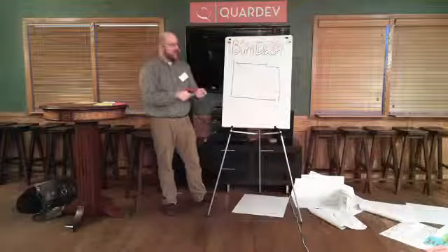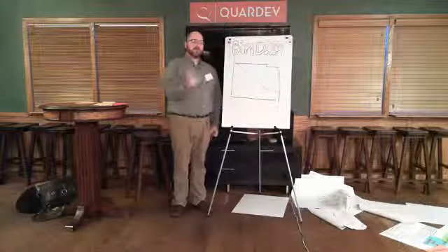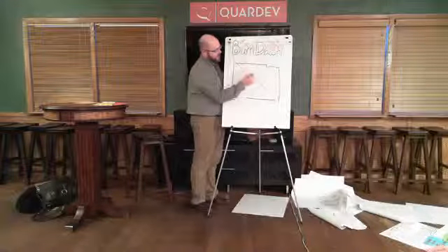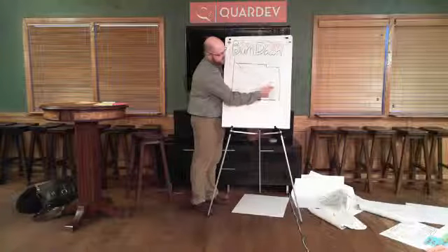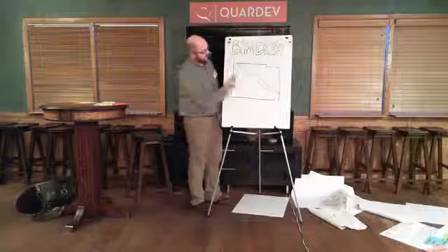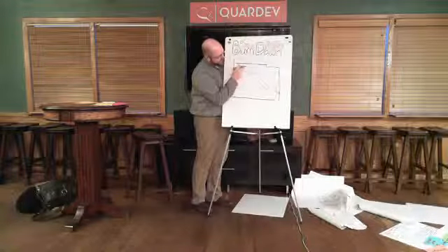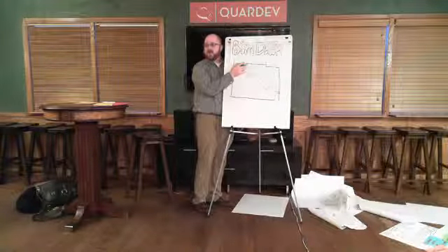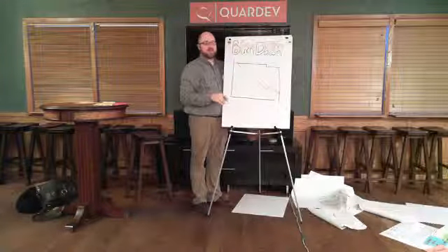But an exciting thing here, I bet you can see where this is going. Let's burn down acceptance tests that are completed. So how many tests do we plan to do at the beginning? It gives you this square shape a little bit. And it might go up sometimes as we discover stuff. And this isn't a great outcome, but it's truth sometimes. We understand, are we going to make it? And in this diagram, we were never going to make it. We should have been having conversations to get below that line. That's what we want here. It changes our behavior. So we want that out of that burndown chart. It tells us something that's actionable that we believe at least has a chance of being true.